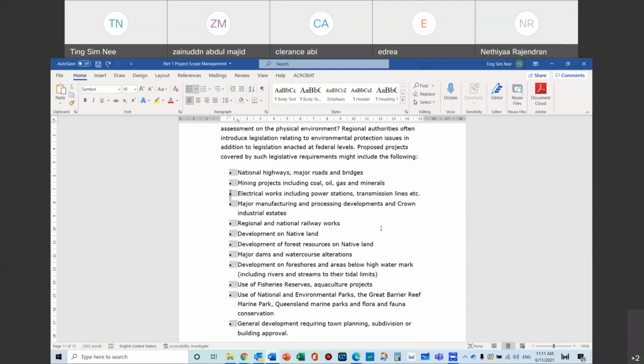Then the second layer, you think about where this project is located or what this project is going to be used for. So you think about all the second layer issues, which are directly impacting, like land codes, maybe the local land issues, local environmental issues, NREB, all these things come into that second layer. Is there any cultural heritage problem associated with that? Is there any social issue related to that? What is the demographic like in the area? What is the income level like in the area? Who are the people staying there? Who are the people affected?